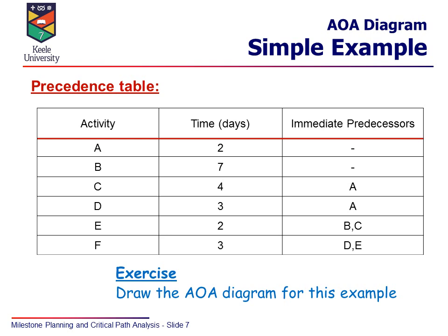The one thing we did introduce here was the precedence table, and this is really important. You'll face this with the Whitbread case. Once you've broken down your project into its discrete activities and tasks and identified and estimated the expected times for those, you should also be in a position to identify which activities have to be completed before another can start.